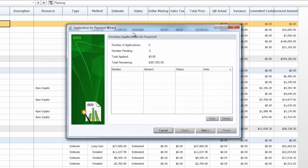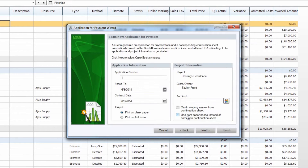On the first screen you'll see the number of applications that you have currently created, the number that are pending, the total amount applied for, and the total remaining or your balance to finish. In this case this is our first application for payment, so the only thing that we have a numerical value for is the total remaining, which is the same as our project total for the entire estimate.